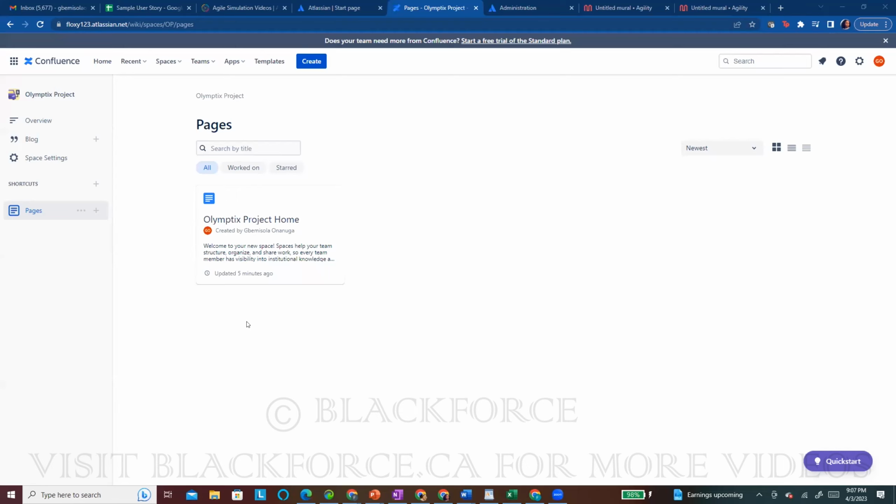You have to gather requirements. When you gather requirements, you use the requirements to generate user stories. And before your user story, you get an epic out of the requirement, then you break it down to user stories. Then from there, you, let me read it. I'll get back. No problem.